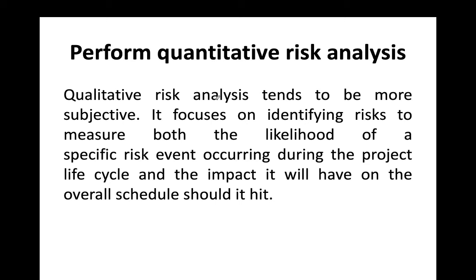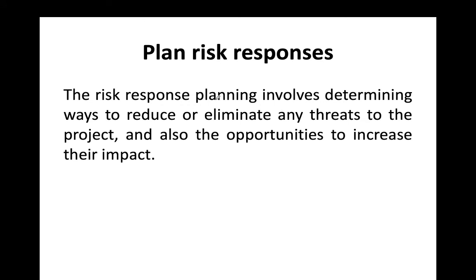Identifying risk means knowing that rain or snow can affect our process; qualitative risk analysis means analyzing the data to confirm it. The fourth step is perform quantitative risk analysis, which tends to be more subjective. It focuses on identified risks to measure both the likelihood of a specific risk event occurring during the project life cycle and the impact it will have on the overall schedule. For example, if a similar rainfall affected another project at a certain level, we apply that insight to our own project timeline.